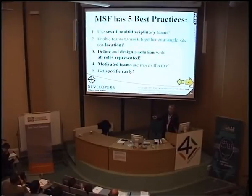Many people worldwide say that we cannot get the requirements early. So we start the project, and then the customer changes what? The scope. Yes or no? How do we solve it? It's very easy. When you get the requirements from the customer, make him sign the requirements. So when he changes it, you charge him for this.